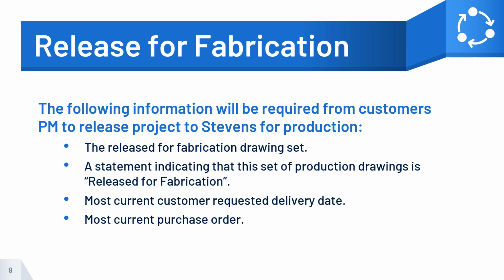The following information will be required from customer's project manager to release project to Stephen's for production. The released for fabrication drawing set. A statement indicating that this set of production drawings is released for fabrication. Most current customer requested delivery date. And the most current purchase order.